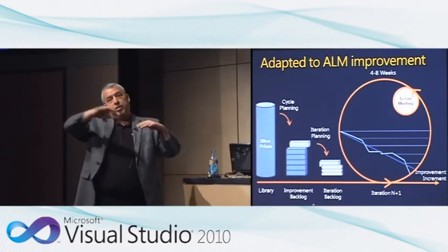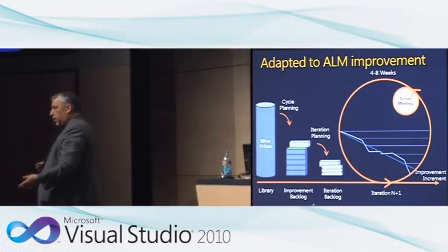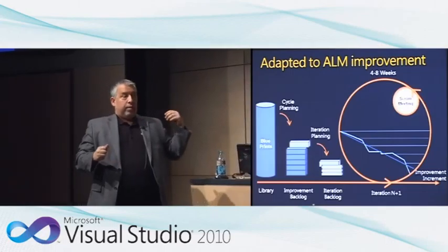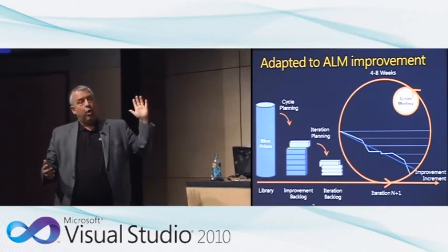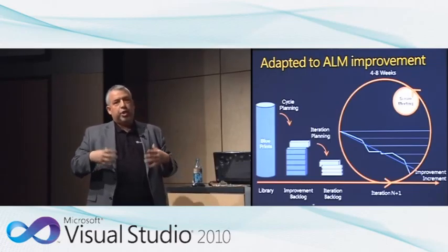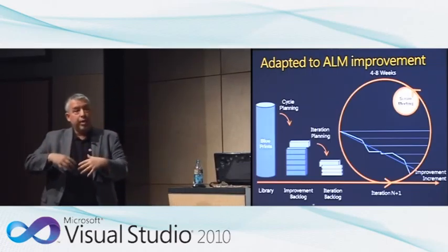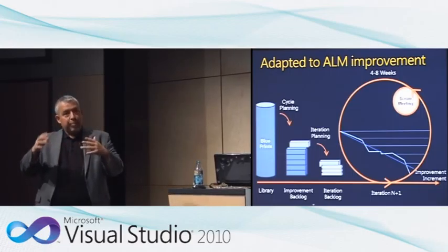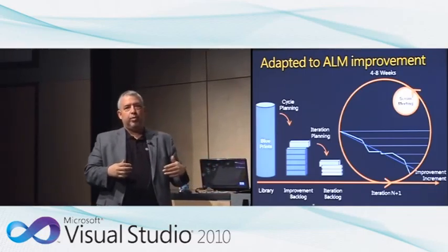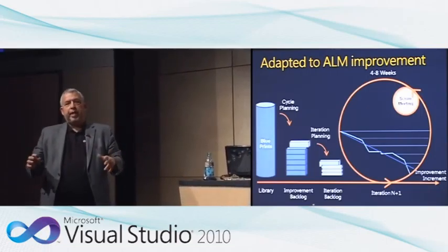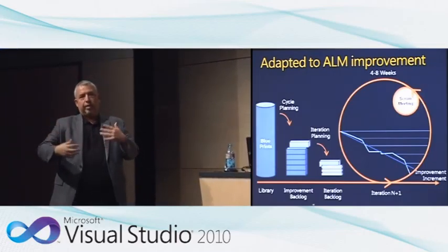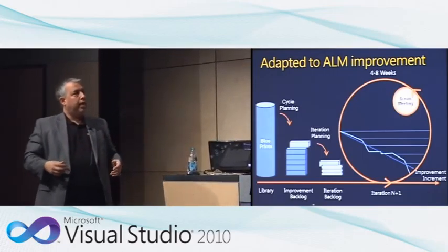So instead of writing reports on which tool we should use or creating long studies, we actually pick, let's get this team working this way for this specific practice. Like in Scrum, we'll break it down, create iterations. We actually extend the iteration to 4 to 8 weeks instead of the traditional 2 to 4. The reason is that it's change, and a lot of the people we're working with, the team that we assemble to work on the project itself, are not typically all full-time. We also need to train people on the teams, and they have portfolios to deliver on as we go. So from a change management perspective, 4 to 8 week iterations make more sense for us to actually book, plan, get the people in the rooms, train them, and do all the tasks we need to do so we get our improvement done in practice.